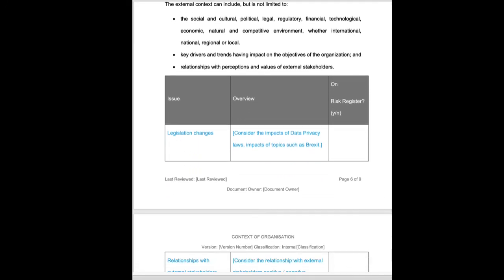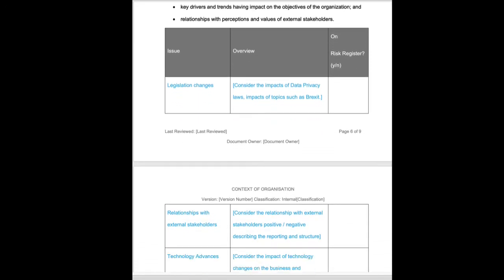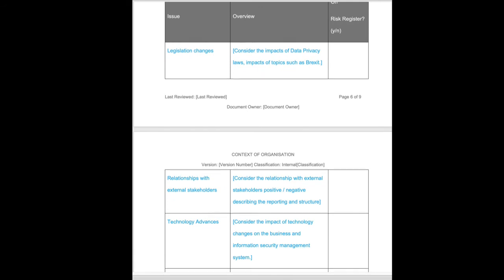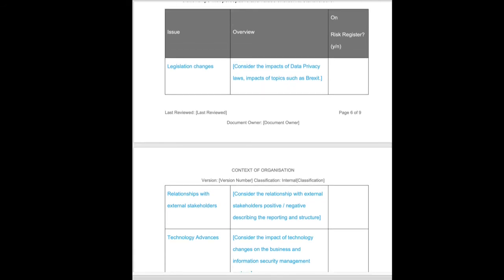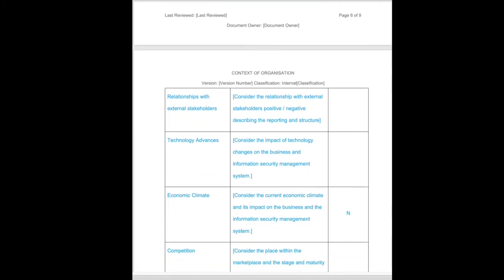We're going to follow a very similar format for external issues. These are issues external to the business. So legislation changes within your geography. In the UK, the impacts of Brexit and the changes within data protection law. There may be legislation changes coming in if you're in a regulated environment or industry. Again, both positive and negative. If negative and it needs managing, we're going to add it to the risk register.